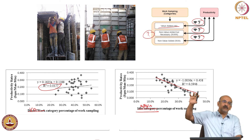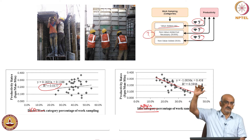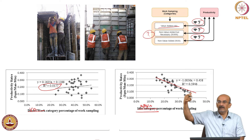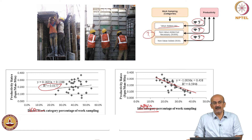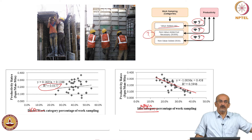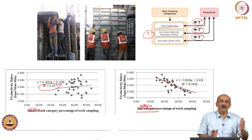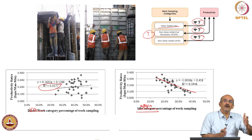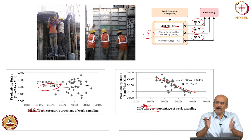The reporting levels for earned value systems are at a very high level — periodic reporting is monthly. If I prepare my earned value report now, the data is about a month old. My productivity measurement system data is about one or two weeks old. My work sampling should be only a few days old. So you get the feel of where each fits in.